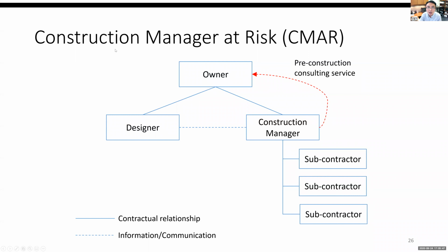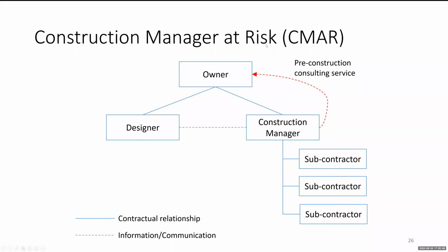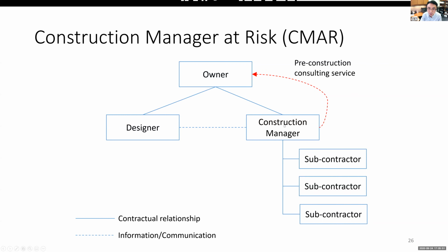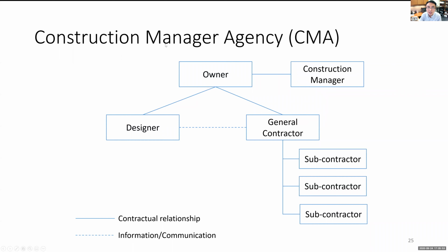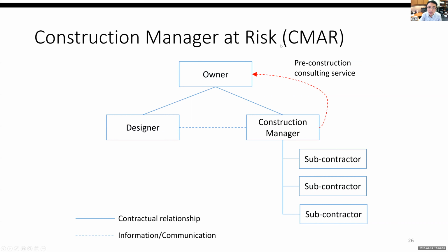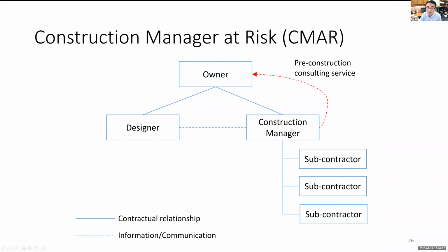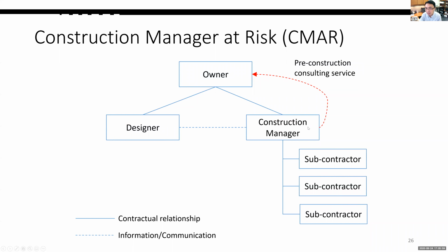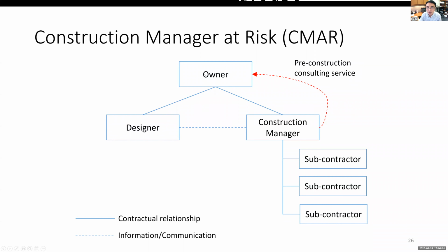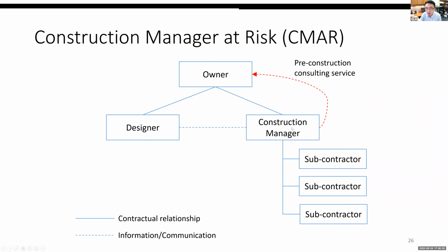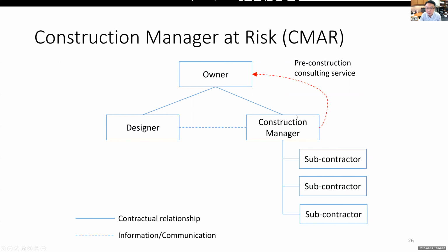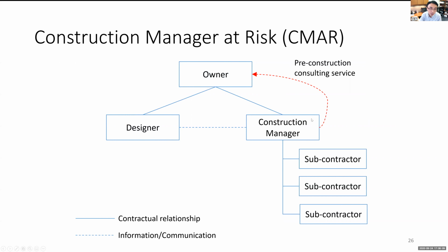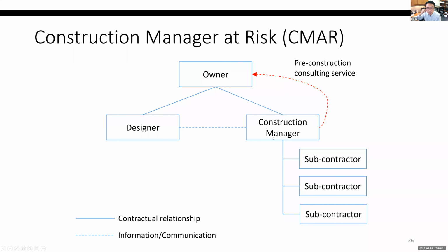So this one is called construction manager at risk. Why do we call this at risk? Because you are not just providing consulting service like an agency, but you are actually taking the risk for what you sign. All right, it looks better. So the owner would have more construction knowledge or constructability knowledge at the early phase of the design. Great, but there's still a problem with this design.